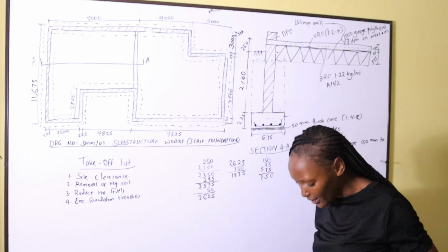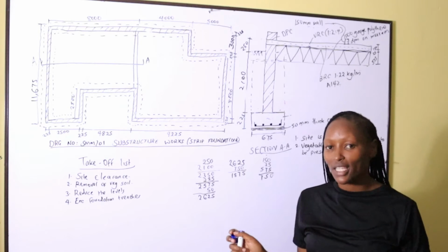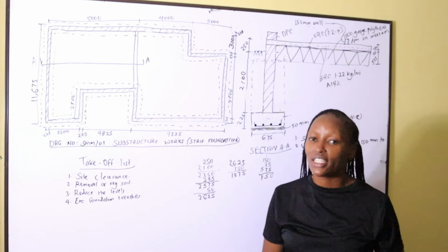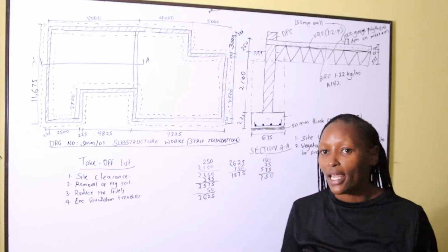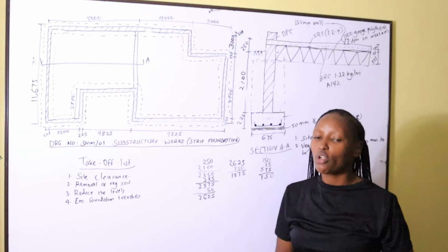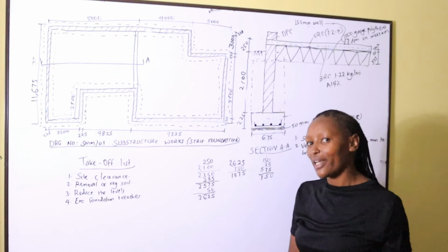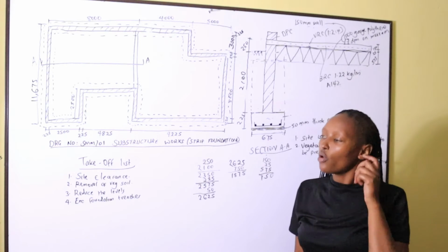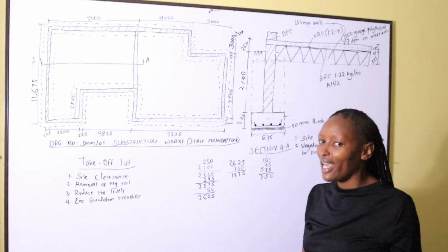When we are excavating trenches, according to our method of measurement, the SMM, we usually excavate trenches in stages of 1.5 meters deep. What do I mean? The first 1.5 meters deep is costed separately from the next 1.5 meters deep, and the next.